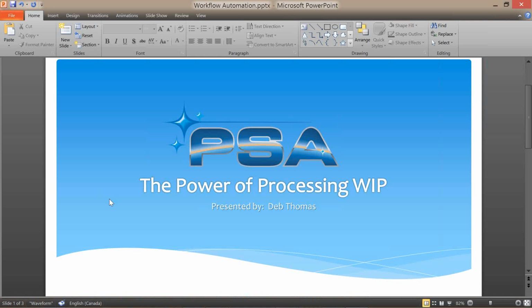So let's say today is the 16th and I finally got my last cost in for April. I want to do the last WIP for April. If I forget to change the date to April 30th and I realize afterwards, I would undo WIP so that I could change the date. That would be the biggest reason for me to undo WIP.